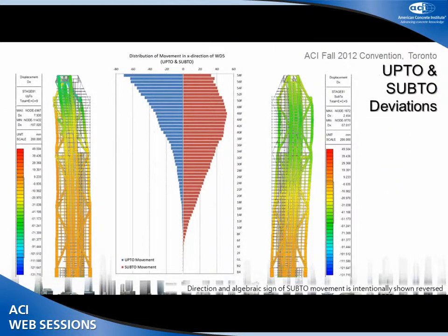After considering the survey method planned for the construction, preset for sub-to movement was adopted. The up-to movement shall be compensated at each level by constantly relocating the design coordinates. By this way, the preset can be done more precisely and effectively.